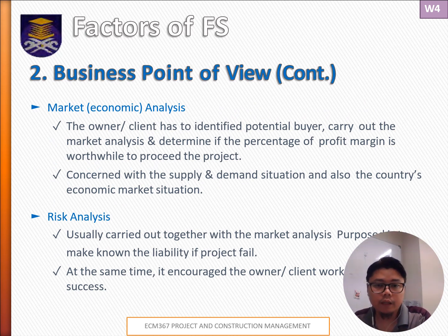Next, we turn to market analysis. So this one, it involves identifying potential buyers and conducting a thorough market analysis to determine if the expected profit margin justifies the project, considering the supply and demand and the broader economic climate. Like if it's for a housing area, is there any demand? Is there proof that there are potential buyers if we proceed with the project, like that, right? And lastly is the risk analysis.